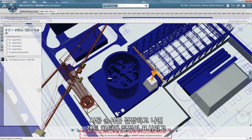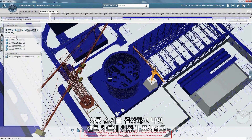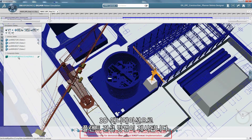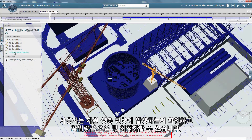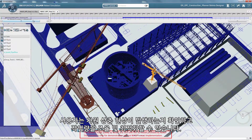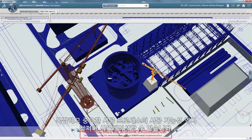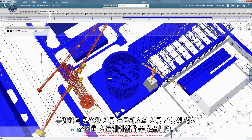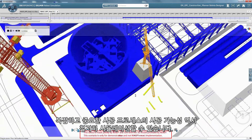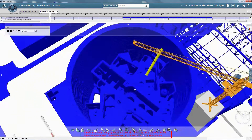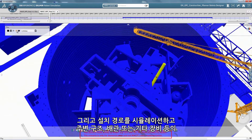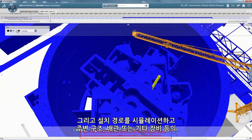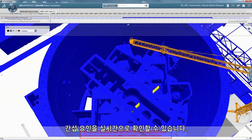Once sequencing is decided, the schedule is displayed in a Gantt chart and an animation shows in 3D how the plant will be built up. You can check whether resource conflicts occur and balance and optimize the workload. Constructability can also be simulated in detail for complex and critical construction processes. Installation paths can be simulated while interferences are dynamically checked with the surrounding structure, piping or other equipment.